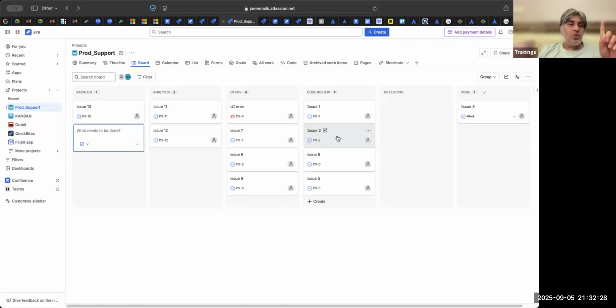If one person is doing it, then he cannot handle more than 2 code reviews. Can one person in one day handle 6 code reviews? No, that's not possible. He will be able to handle only 2 code reviews if one person is doing it. So I have two choices. Either I say everybody does code review, all the 3 developers, or I say out of 3, the most senior does code review, but he can only do 2.